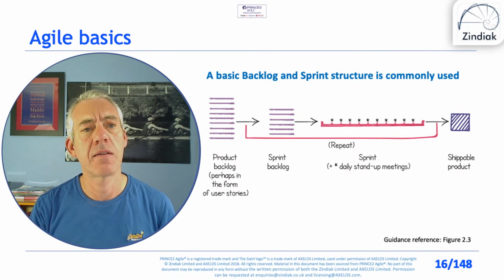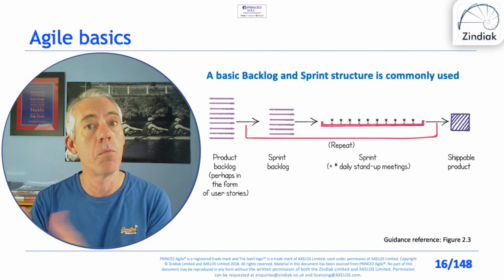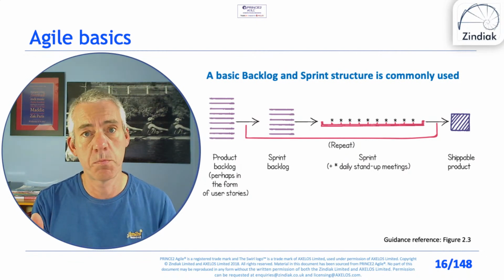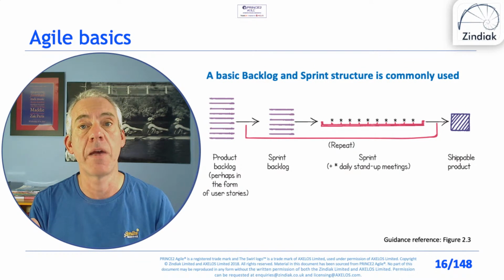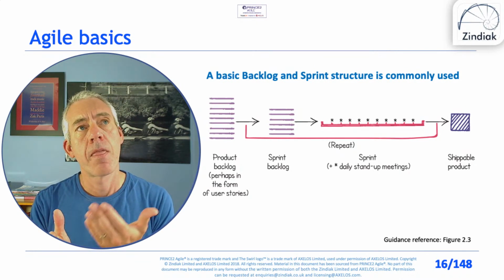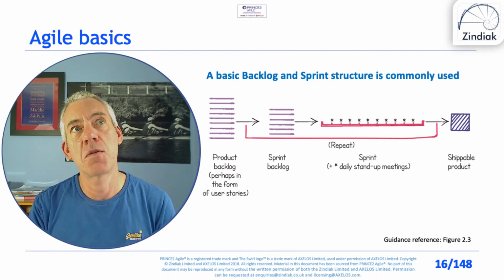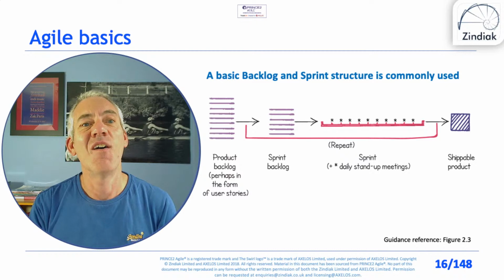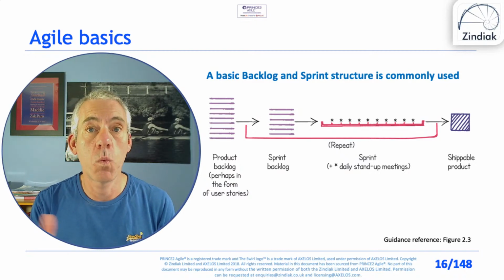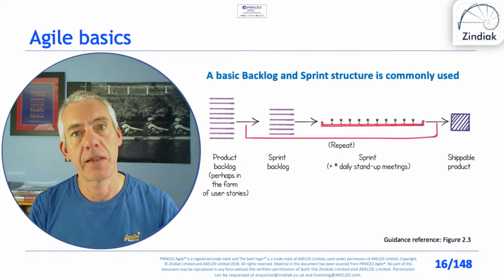Just one point I'd make here. In Scrum, the sprint can be one month or less. They don't place a lower time limit. Typical guidance recommends two to four weeks. Certainly many, if not most, if possibly all, organisations I see where they go to week-long sprints aren't really doing this.